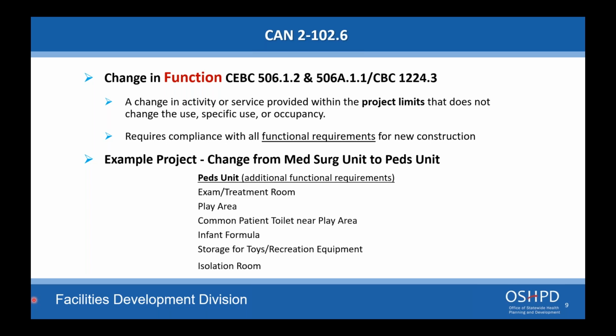So if your med-surg unit is being converted to pediatric unit, you only need to provide those additional functional requirements. All the existing functional requirements, the patient room is still a patient room, does not have to be upgraded. Okay, so only looking at the new functional requirements.